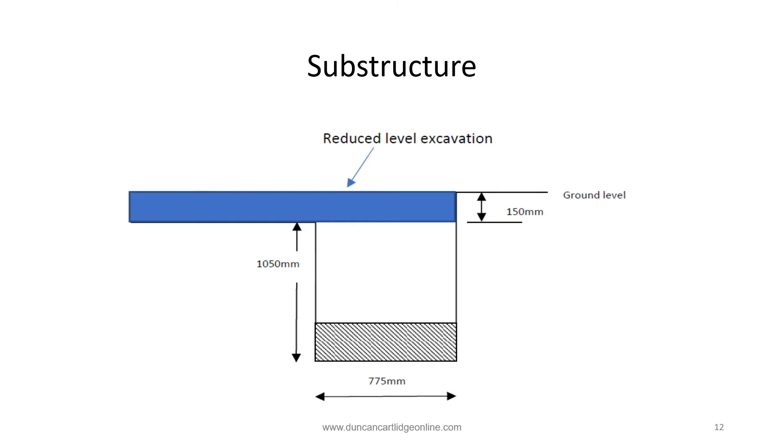Following clearing the site the first task is to reduce levels as shown in blue on this page. Reducing levels is taken for the entire footprint of the building to the external face of the foundations. All excavation of course produces varying amounts of excavated material. Some can be used in making up levels under landscaped areas but much of it has to be removed from the site as it is unsuitable. Any contaminated excavated material has to be kept separate and disposed of carefully in an appropriate tip.